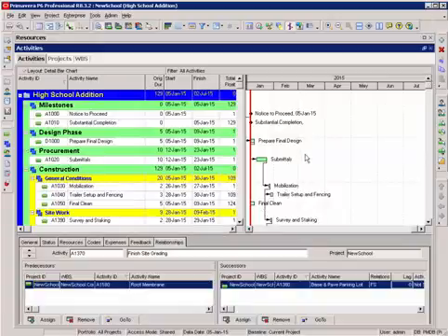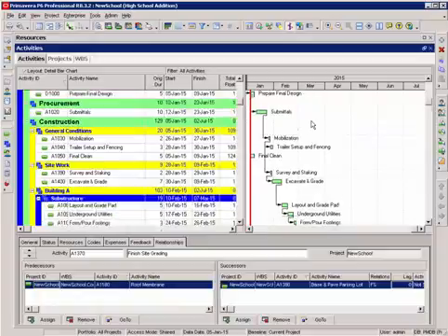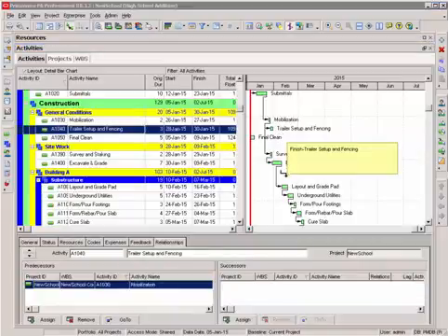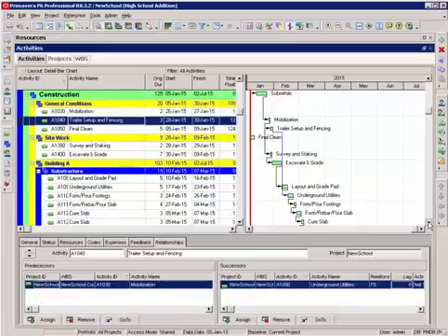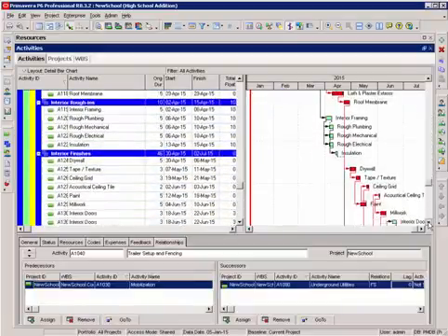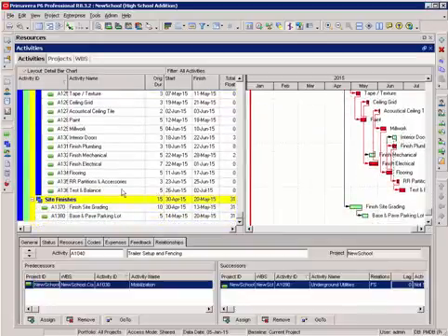So my third step in completing my schedule logic is going through each section and making sure there's a completion activity. I'm skipping my final clean. That has its own issue. I'm going to tie my trailer setup and fencing to my underground utilities to make sure I have fencing for all my materials stored. All of these have a finish activity. The only ones that don't have a finish activity is my test and balance in my base and pave parking lot.